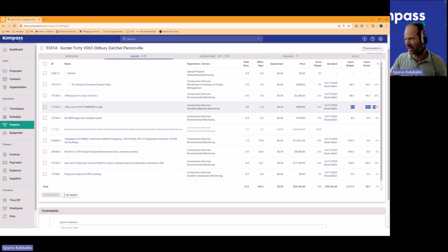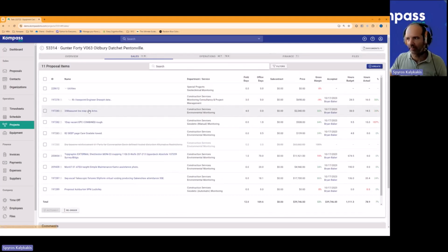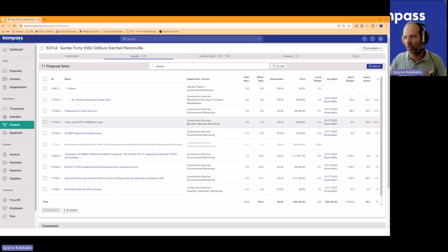You are at 157% for one day. That might be feedback for yourself: if you see that happening over and over again in that particular proposal item, that might be a moment of truth, saying that even though the project overall is okay, I'm constantly failing on that one.